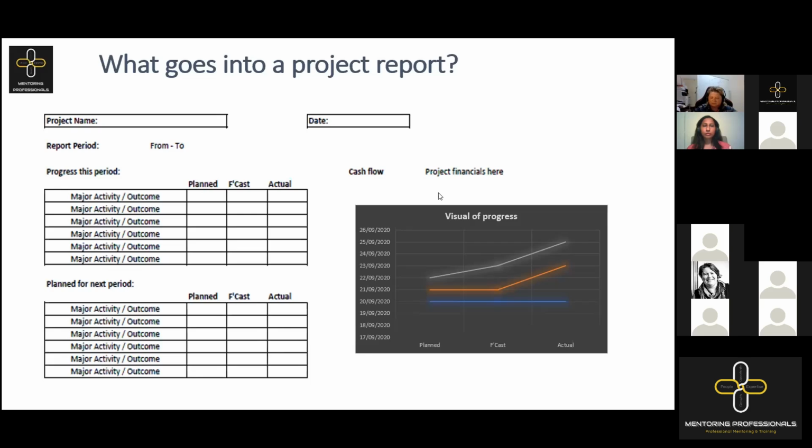It highlights that requirements weren't necessarily captured correctly at the beginning. Good. That's exactly what we want. Those requirements might not have been captured properly in the beginning. Nothing worse than delivering a new finance system, for example, that can't actually do reporting and not knowing about it until you get to your financial year end. That one's a true example, by the way. It wasn't noticed that this new system couldn't do reporting, and it caused a lot of problems to the organization that was implementing it.